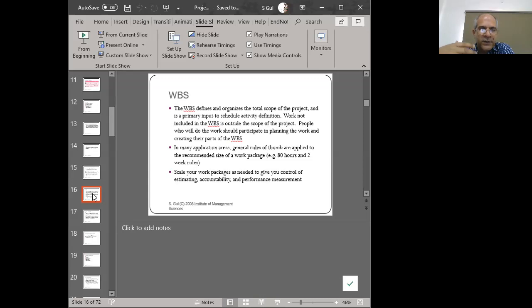Now, here you can apply different techniques. One is that you can actually go through the motions of decomposing an activity into smaller pieces, or if you have previous experience, then you can rely on things like heuristics, which are rules of thumb. And if you have a certain heuristic available, then please do use it because it makes your life much easier. Heuristics such as, you know, 5 people are needed in order to do 60 hours of work in 3 days, I suppose, right? So if you have a heuristic of that nature, you use that.